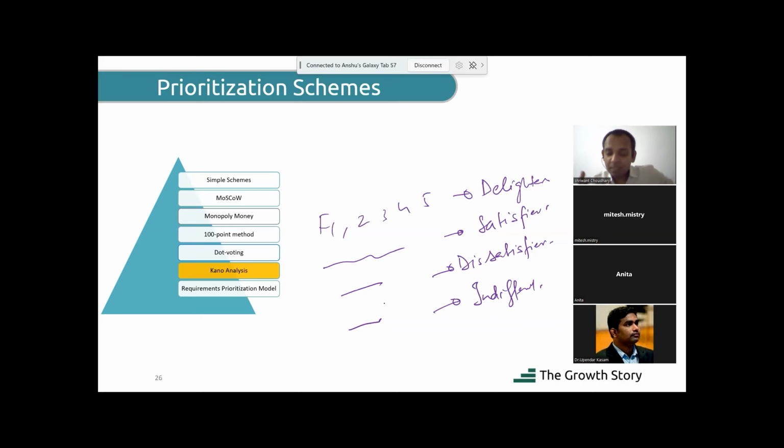this we will talk about just after this, in the discussion about contracts. How typically agile contracts work, yesterday also Upen gave us a very good example, is that payments are done after every successful iteration. If the iteration is accepted, then the payment will come. If the iteration is not accepted, no payment.